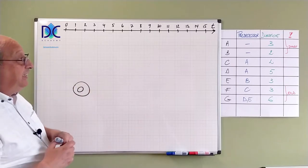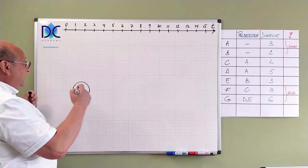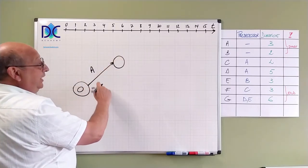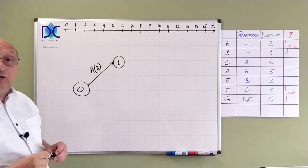Now we have activity A, no predecessors. So it starts immediately at the beginning of the project. So we have A, activity A with a duration of three periods, which ends up in node one.